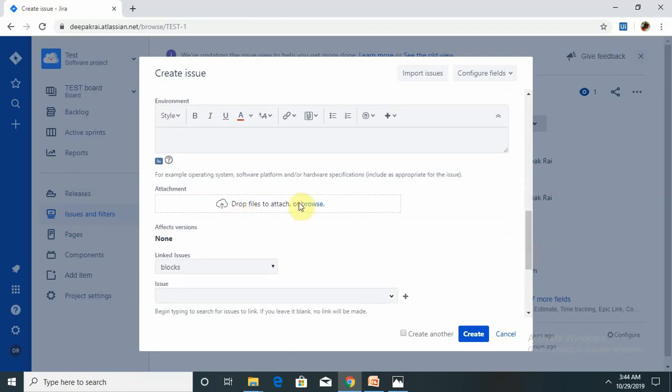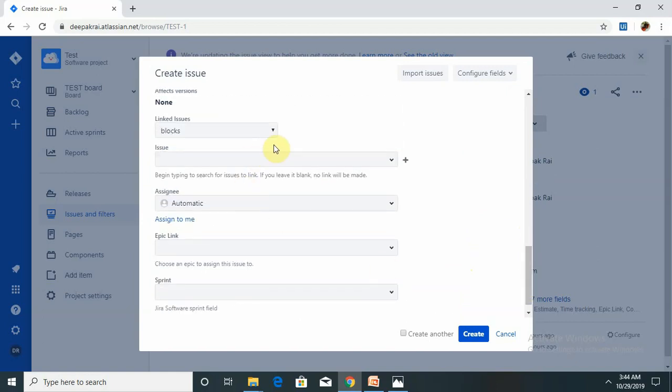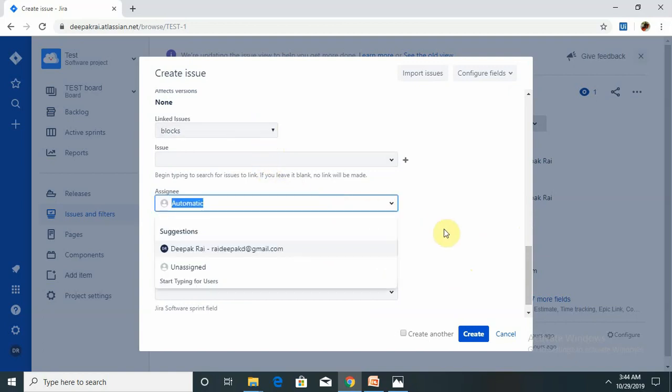Then attachment - in that attachment you can attach your screenshot or Word document or anything which is supported to that defect. Blocks - if any issue is linked to that, you can select block. Assignee - assign the person who is going to change that, or the development lead. If tester is raising that defect and it is a project manager, the project manager should directly assign to the sprint holder. So sprint person is responsible for that defect.